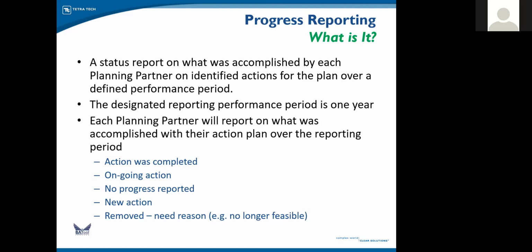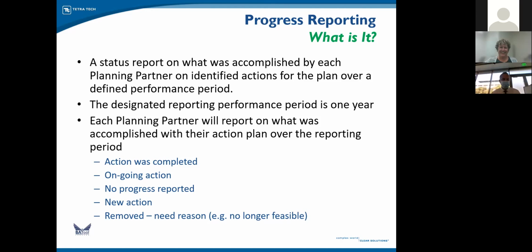Ongoing action, that would be something that you're doing year after year after year. So something like fire prevention, if you're going out and doing debris removal or something like that, or fire prevention work, that's an ongoing action. One of the action items that we put in there was to support the ongoing effort of the hazard mitigation planning process throughout the whole county. If that's an ongoing action, that would be what you report on there. No progress. If you haven't done anything, that's fine. You just need to let us know.